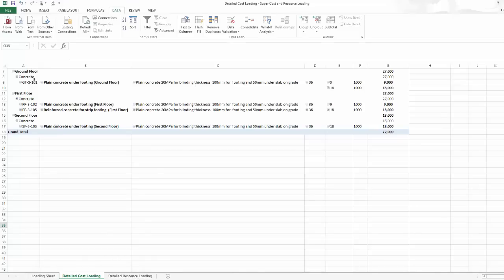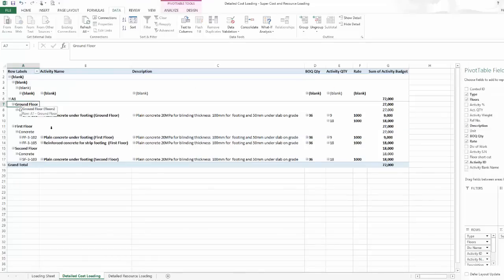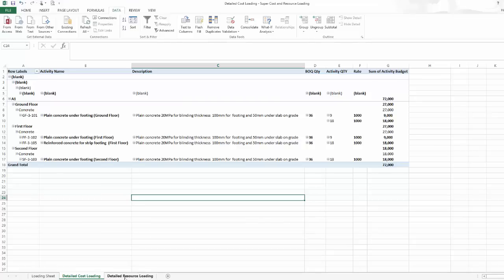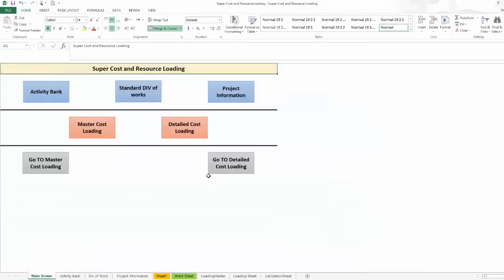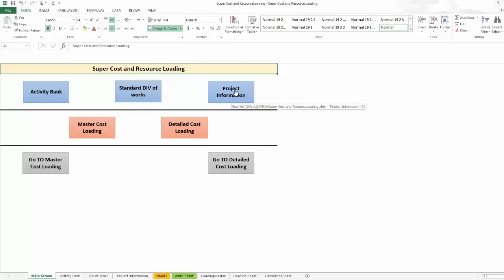So what we have covered: I can create an activity bank and keep growing it — adding projects to it — so I have a standard activity list. My standard division of work will be done one time, and the project information will vary from one project to another.